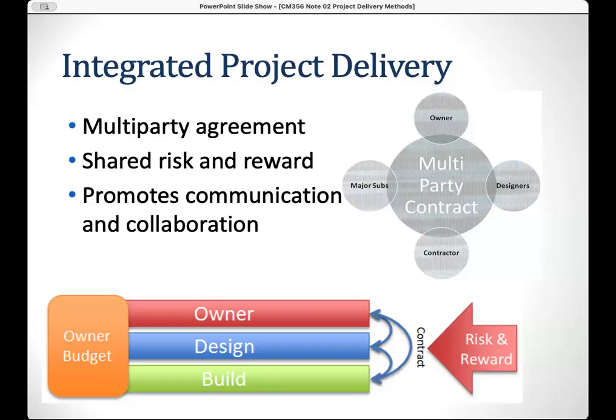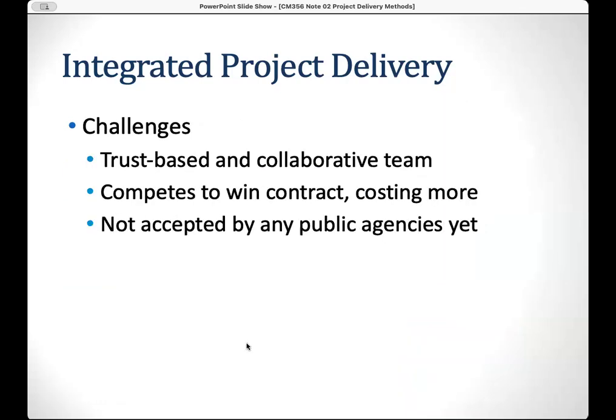For the integrated project delivery, you will see they have a multiple-party contract: the owner, the designer, the contractor, and also the major subcontractors. They share the risk and the reward, and it promotes communication and collaboration. The rewards and the risk are shared by the owner, designer, and builder.